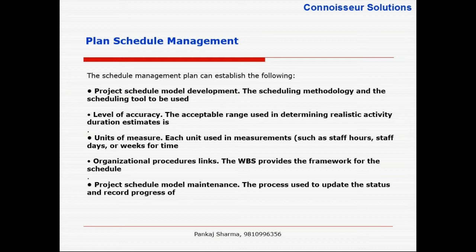See, my take here, based on my experience on projects, is that the goof-up happens when people start saying, my work is 75% done, 80% done, 60% done. The work is either done or not done. So at the activity level, it should always be less than a day. Okay, got it. For example, if the lowest-level work package for a supplier is 10 days, and this deliverable is broken down into 10 activities of one day each, then on the fifth day I will be very sure that, as per the plan, 5 should have been done. But if only 3 activities are done, I'm lagging behind the plan. That visibility is very clear when you have day-level decomposition of activities.